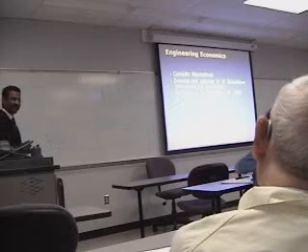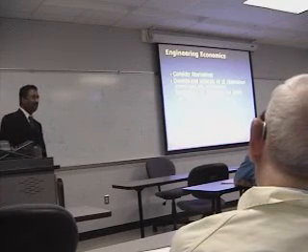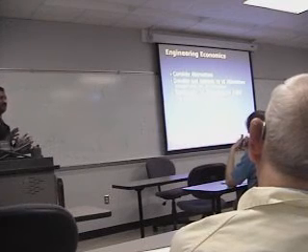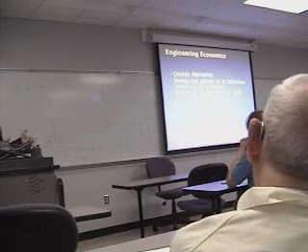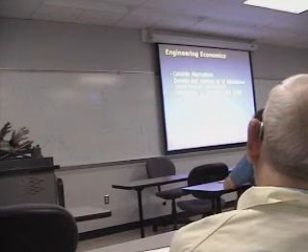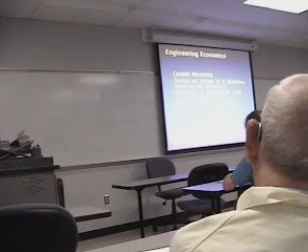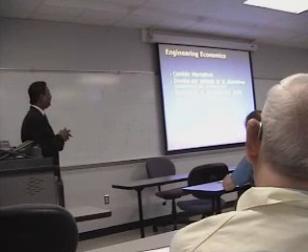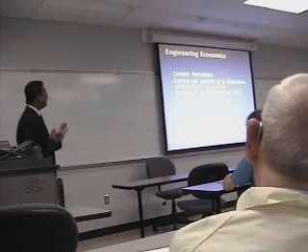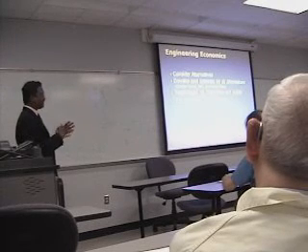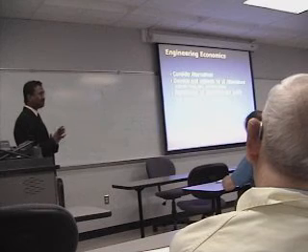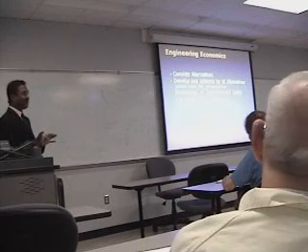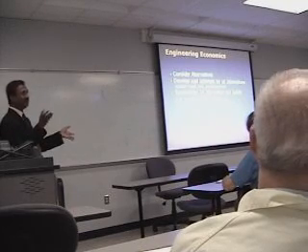And again, the most important part is the engineering economics, where for any project, the engineer always considers several alternatives. It's not like a client comes to you with a problem and you just say, okay, this is my solution. You have to provide 3 or 4, and the state also recommends that, and there are guidelines for that. So we develop alternatives, and we also develop a very detailed cost estimate for each alternative. And it's not sufficient to just develop the capital cost. Sometimes the capital may be very low, but your O&M cost